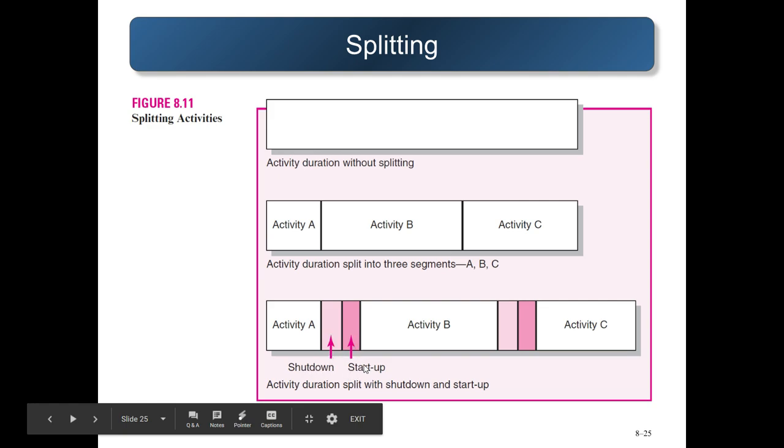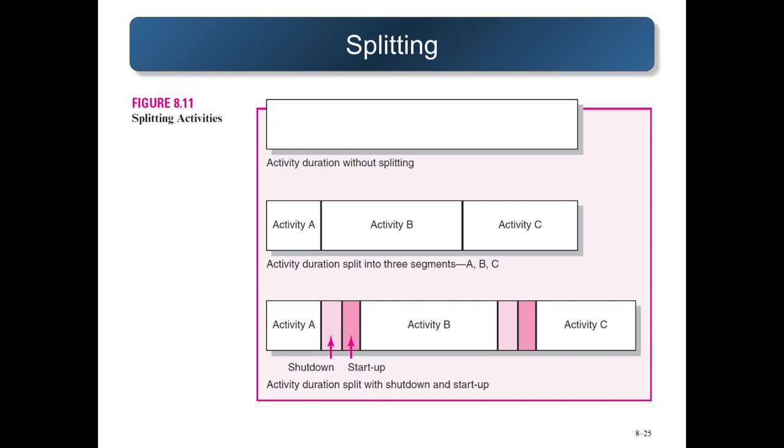Splitting is used for various reasons and decisions by a certain organization. It could be a resource break to increase efficiency, or to have a fresh outlook of ideas, or perhaps an outside perspective. But one thing is for sure, splitting is not advisable when startup or shutdown costs are high.